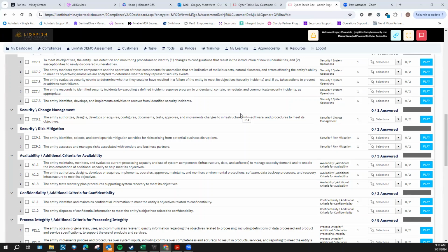that talks about all these different parts, and during your meeting you're going to go over all these with your change control board. Your change control board technically could be you and yourself, and you just go over all these things and document them for yourself. But if you have a larger organization, which you probably do when you have a board of directors, you're going to go through a change control meeting with the appropriate group, like engineering or executives, or you're going to want to invite at least one of them from every group into your change control meeting and hold a change control session where you go over all these things and document them.